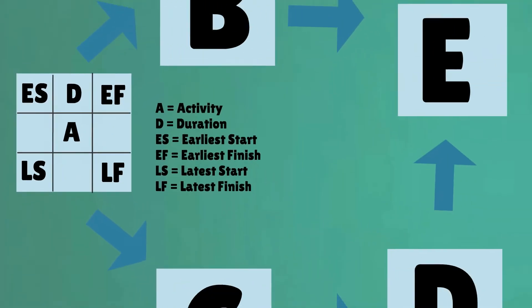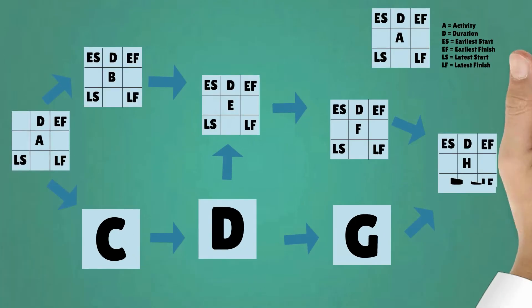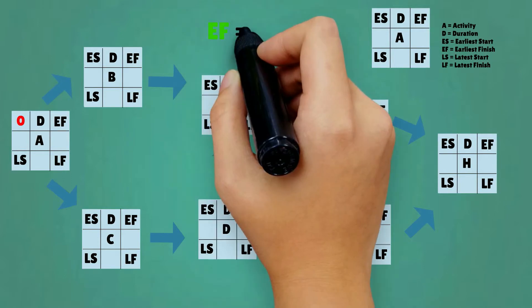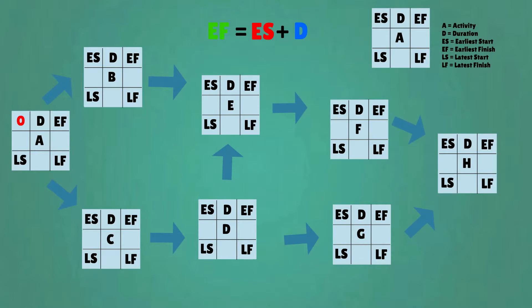To find out what the fastest time is to finish the project, we fill out the first line of the cubicles. We start with zero, as week zero is the starting point of the project. We use the formula early finish equals early start plus duration to fill out the remaining lines of the cubicles.